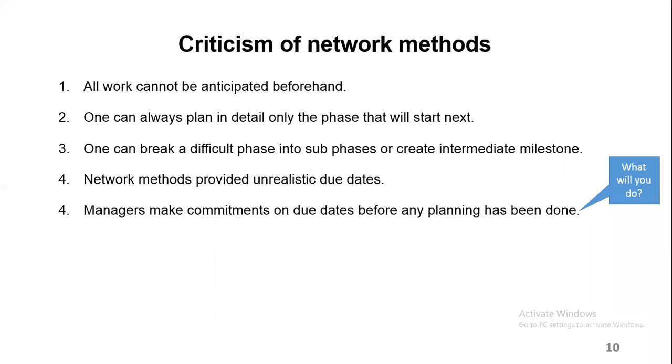You can explain to him, okay, you promised them 2 weeks, but I'm telling you this will take 6 months. I can rush the process, but there will be compromises involved. The quality will be affected. The costs will be affected. You list all those things. You tell him this might even lead to project failure. There might be some risks involved. You're going to have to overwork the people. Safety is involved. You highlight all that to him.